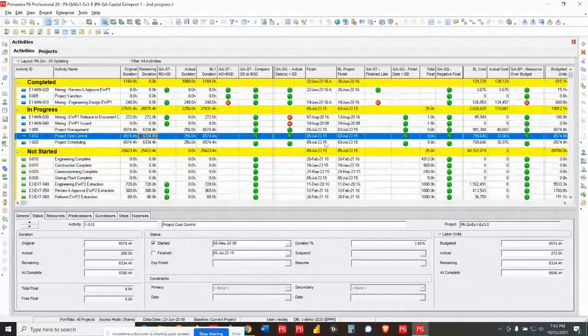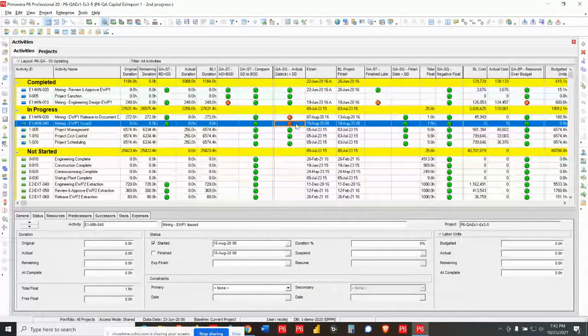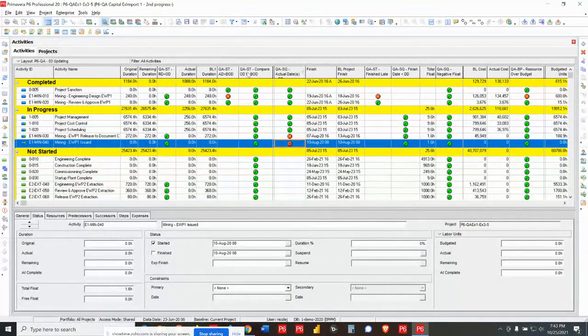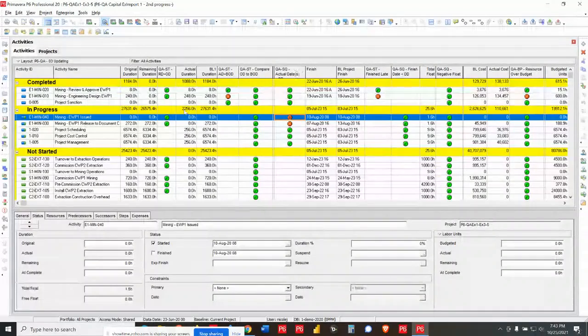And then here you go. You can start to see some of the ones that I did those updates on, and we can see where those busts are. Okay, so here's the one where the actual start date is after the data date. So this flags it very easily. Not an easy one to find on your own necessarily. Okay, so this just makes it so simple to run different layouts, to use your grouping and sorting, and automatically run through and find where those busts are.